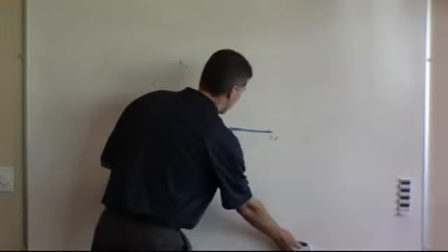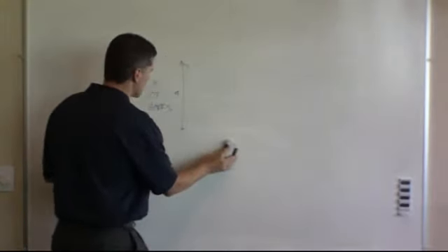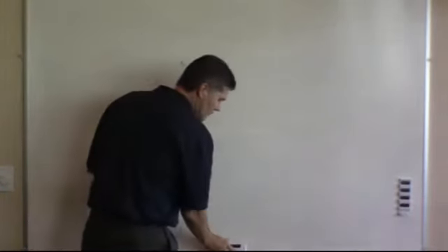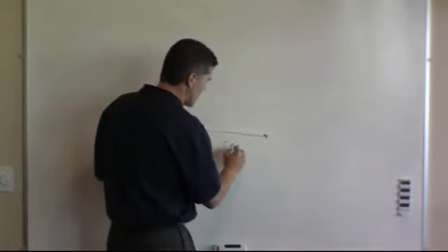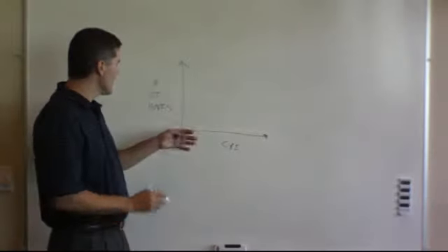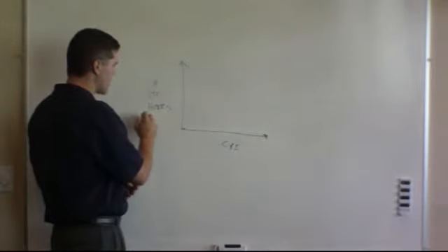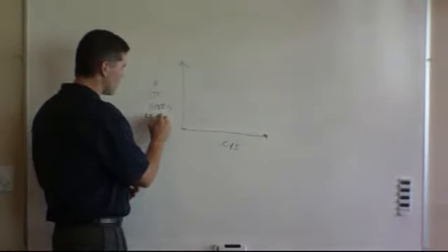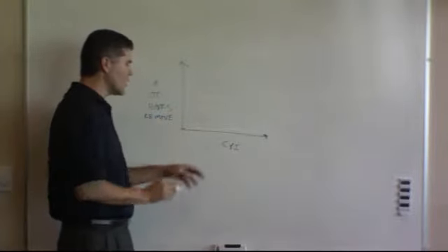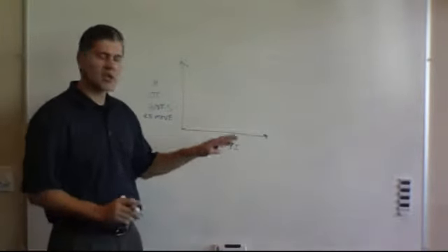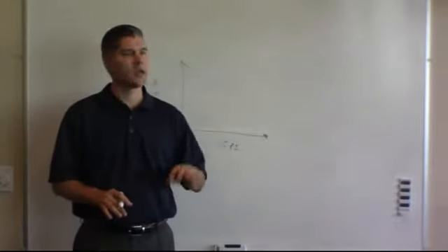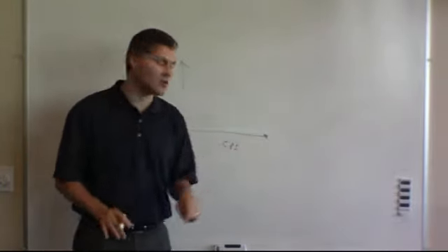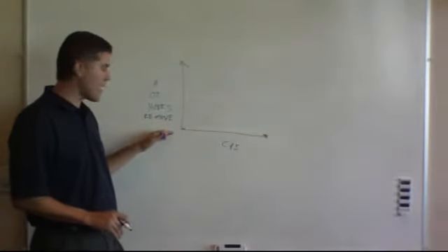Now that was with the schedule pressure, SPI. When it comes to CPI, what we're actually doing is it's the number of overtime hours to remove. Okay? So even if you're ahead of schedule, you're never going to dip into regular hours, regular work hours. You're never going to tell anyone, hey, go take the half a day off, we're ahead of schedule. But it only deals with overtime hours.